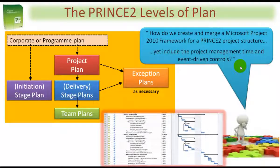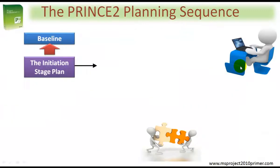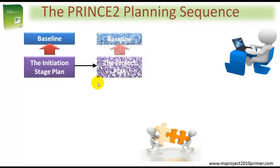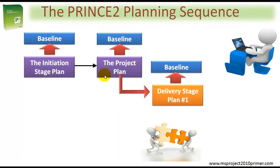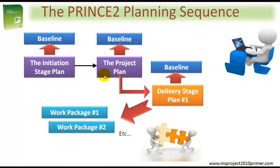I've got great news for you with my modularized templates that you can plug straight into your PRINCE2 projects. Let's have a quick look at the PRINCE2 planning sequence and remind ourselves that the initiation stage plan is first baselined and used to deliver the initiation stage. During that, we create the PID and hence the project plan, which is baselined during the initiation stage. The first of the delivery stage plans are created and baselined and used as a basis to monitor, manage and control. Each PRINCE2 delivery stage is normally broken down into at least one work package.